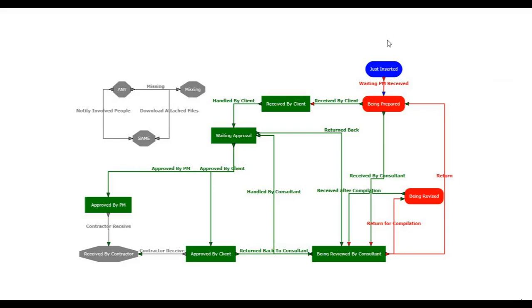In Prosper, we call it status network. The status starts as just inserted, then it goes from just inserted to being prepared. From being prepared, it can go either to received by client, or it can go to be reviewed by consultant.